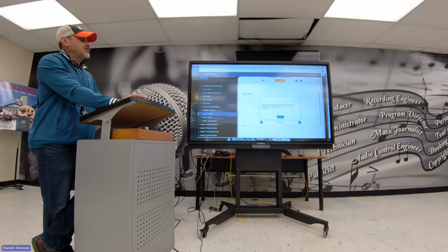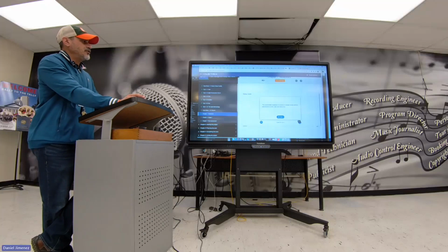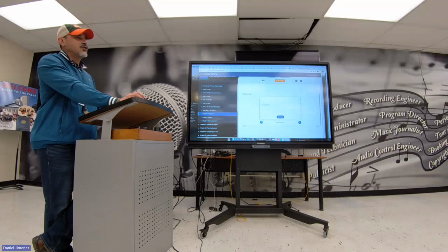The integrated scope, schedule, and cost baselines used for comparison to manage, measure, and control project execution is called a performance measurement baseline, or PMB for short. The uncontrolled expansion to product or project scope without adjustments to time, cost, and resources is called scope creep.